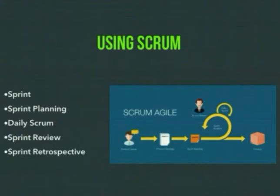It's used to create a plan for improvement to implement during the next sprint. This sprint retrospective happens after the sprint review but before planning the next sprint. For example, after the sprint review, we team members, including the product owner, will have a meeting all together and discuss the current project status or review. During this, we can make changes in the next sprint or learn lessons from our previous failed tasks. At most, this sprint retrospective should be no more than 3 hours per month.